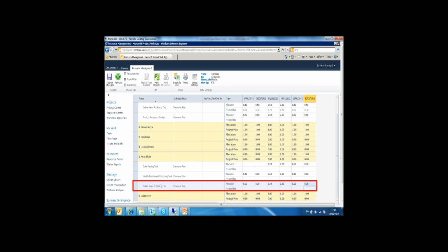A sprint could vary between 2 and, what I've encountered, 4 weeks, where you have certain user stories that you have to hit during this period, and you have to have a full life cycle around them that consists of design, development, and QA.